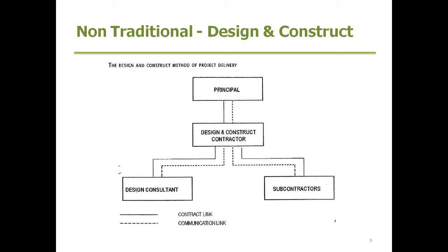adopts a major portion of the risk, this is one form of contract which I strongly believe good contract administration skills are really vital, because you're administering the design and thus the buildability, as well as the speed and the final cost of the project as well.